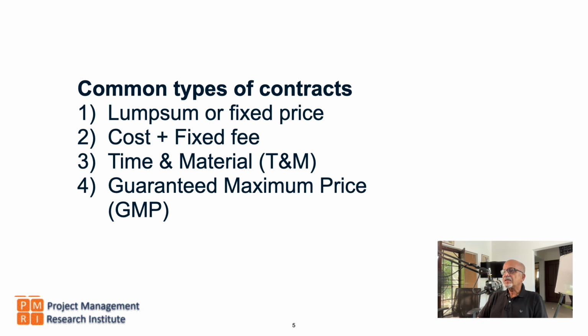That is about guaranteed maximum price. But if the actual cost exceeds the guaranteed maximum price, then it will have to be borne by the seller.